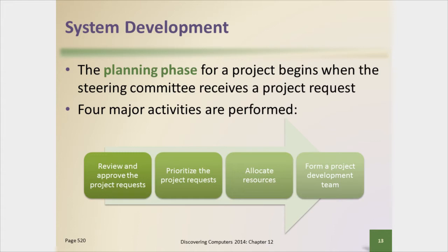You're going to prioritize the project request. Not all projects are created equally. An organization may have lots of different projects that they need to work on, but some are going to be more important to the organization than others. Some, for example, may be mandated due to regulatory requirements. Others may be really important from a competitive perspective. Yet other projects may simply be more for convenience. This is something we'd like to be able to do. So you need to be able to prioritize so that you can tell which ones you need to work on first.